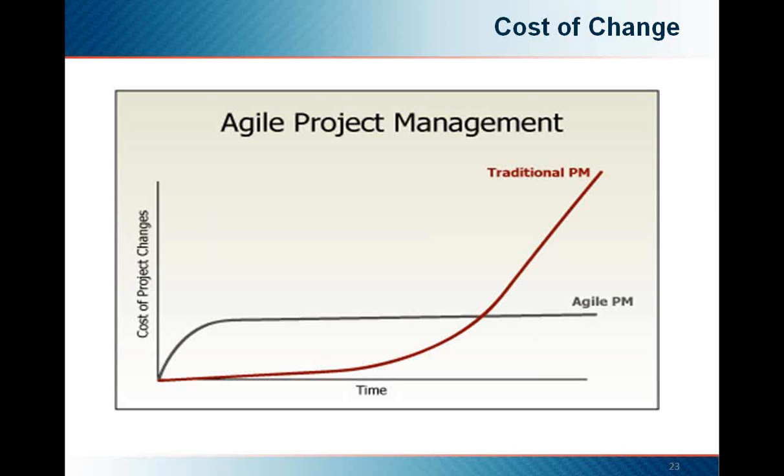Another key feature of Agile is the cost of change. As you have hopefully noticed by now, Agile includes the capability to incorporate changes as the application is being developed, keeping the cost of changes constant. However, in a standard waterfall methodology, changes that come near the end of the project will have a larger cost impact, and this will often lead to a recoding of many parts of the application and extensive regression testing. This is very important when you recall when user acceptance testing occurs in the standard approach.